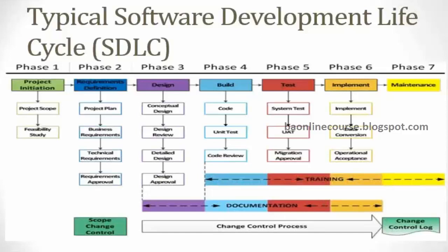Right. Good. So basically, if you have a long project, where the scope is so large that it might take 2-3 years, you break it down into pieces and then work in phases. Each phase would deliver some functionality, and the advantage is that you'll have something to use much earlier. So maybe at the end of 4 or 6 months, right? So that's the advantage of an iterative model. Okay.